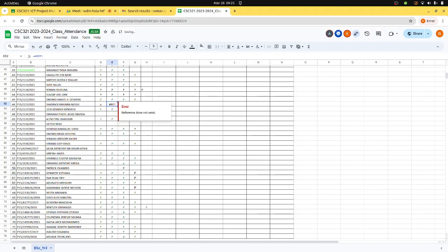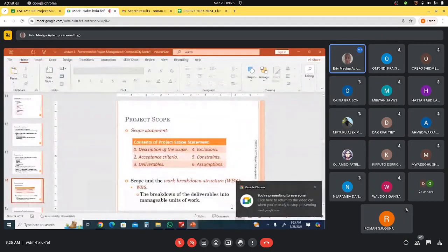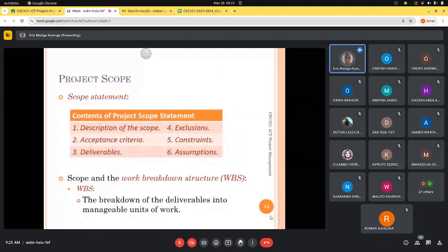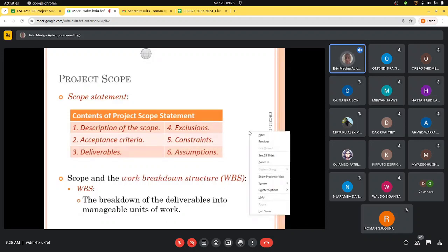So you start this project in June, then it starts raining. When the rain is heavy, you stop work. So instead of delivering that project in 3 months, which the customer was saying, you deliver it in 4 months. So as a constraint in that case, you will say this project is subject to being finished in 3 months if there is no rain.